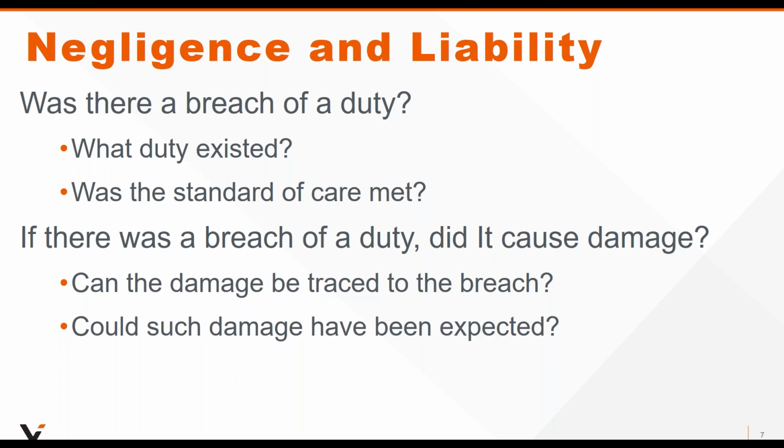If you fail to meet that standard of care, typically it's the assessment as well. Did the building fail? Did something not perform as expected because you were negligent? But in this case, oftentimes the issues that arise are like, well, did you fail to meet the duty and then fail to perform, to provide documents on time, which then impacted the contractor's ability to complete the project.